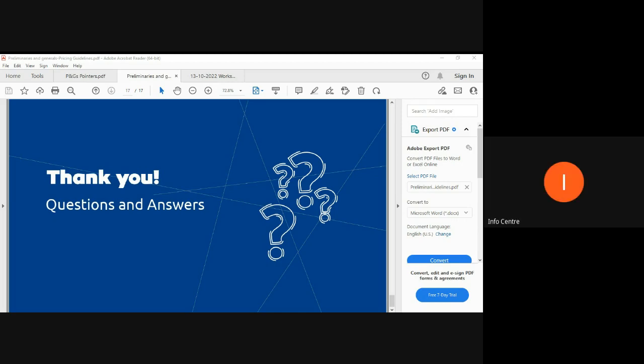Okay, I'm going to answer you in two ways. Very beautiful question. The first is during the pricing process. You want to be very tactical. You want to raise everything, document it, and keep a paper trail. They might not respond to you at that time, but you then proceed to price the work as per the items they have provided, although in your paper trail you've raised all of these things. That's the first one.